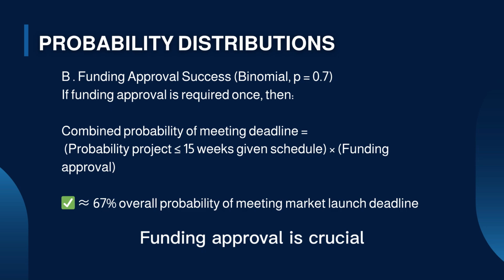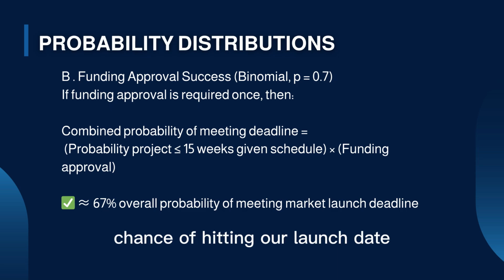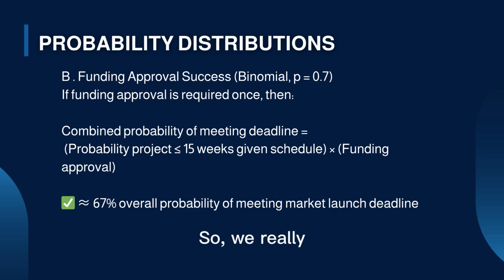Funding approval is crucial for the market launch. We've got a solid 70% chance of getting the green light on the first try. If we nail the project in 15 weeks and secure that funding, we're looking at about a 67% chance of hitting our launch date. So we really need to keep an eye on that funding risk.